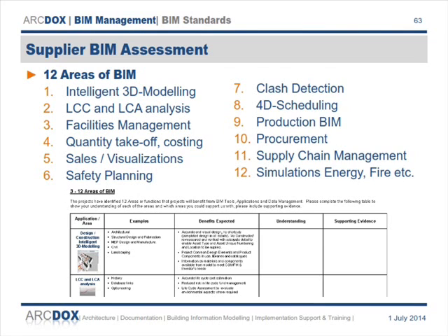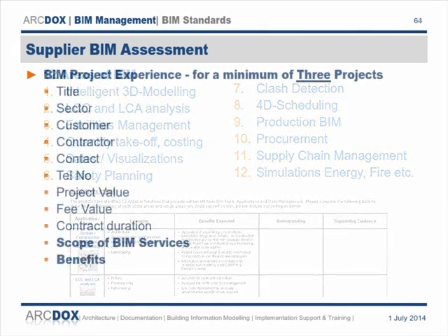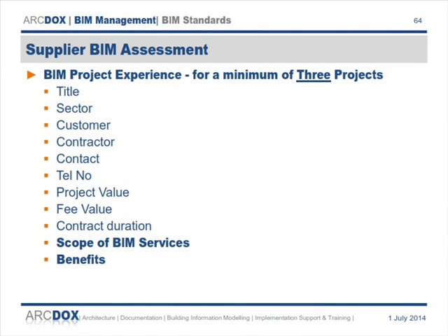You've got to describe your understanding of those benefits, and also provide supporting evidence of how you've actually done that in practice and the benefits that you've actually achieved on your projects. So again, difficult to do with 2 days to go before a tender, to describe what you've done. The third part is very simple, but the tricky part here is you have to describe a minimum of 3 projects that you delivered through BIM and describe the benefits that you achieved on those 3 projects. It can be challenging if you're just starting on your first BIM project.